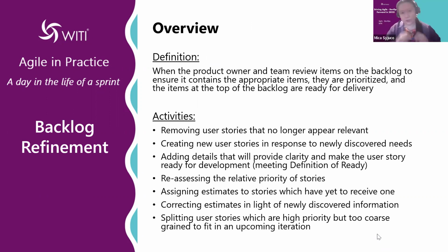So unlike with waterfall, where it's big bang, you plan once, usually it's for everything already. Backlog refinement helps you so that you're continuously doing just-in-time planning and refining the requirements, refining the desirements for the product more and more versus one time, big time. It's like, okay, it's a long list of things. So we prioritize based on the top things in your backlog and you keep refining top to bottom, right? And it just becomes a cycle. And we talked about that as well.